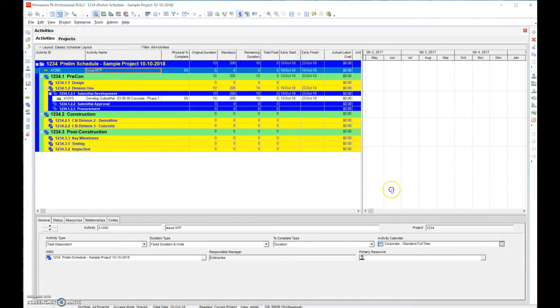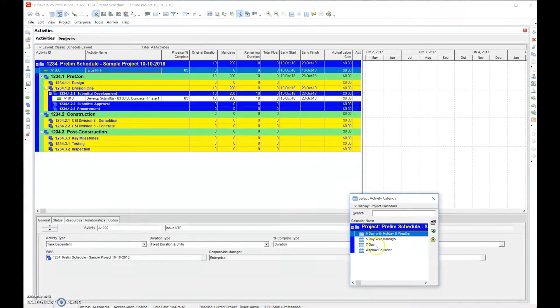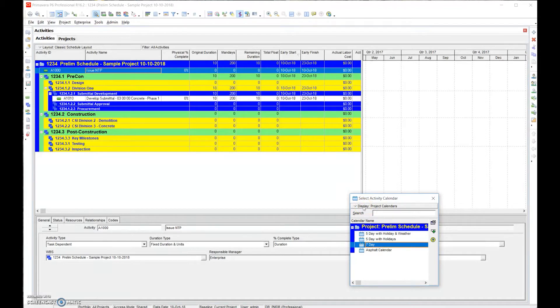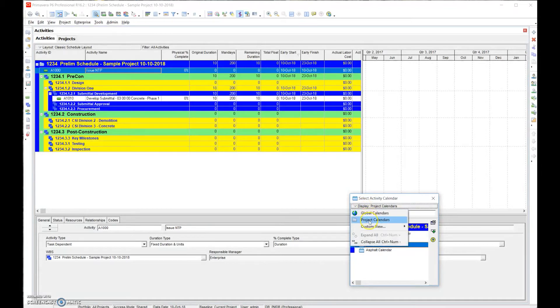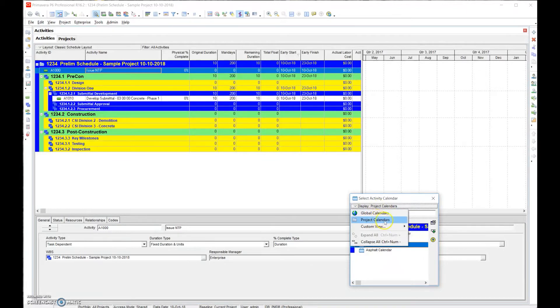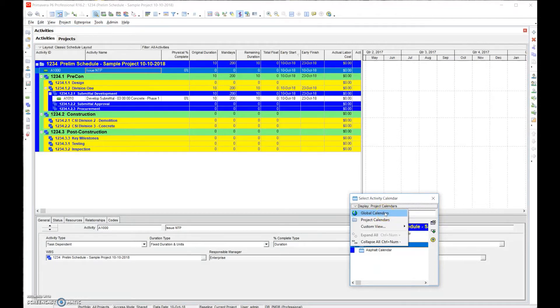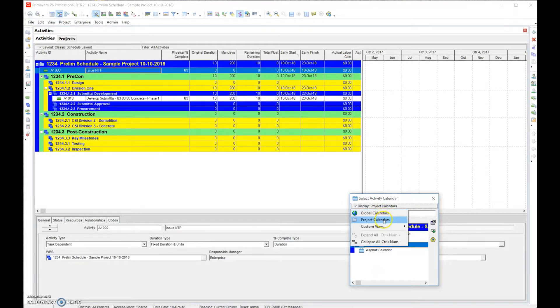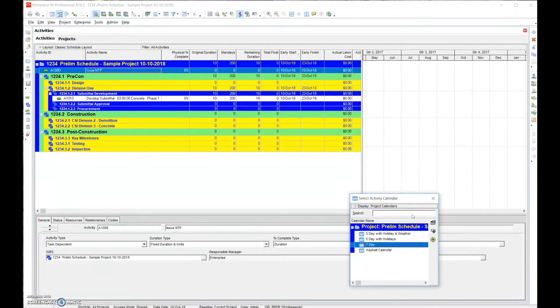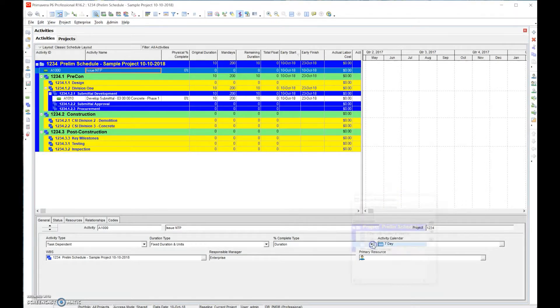If you look up here, one thing I want to point out is you can choose from global calendars or project calendars. Remember we set everything up on a project based calendar, meaning that we're not inserting calendars into somebody else's database. That's what a global calendar is - this one's specific to a project.